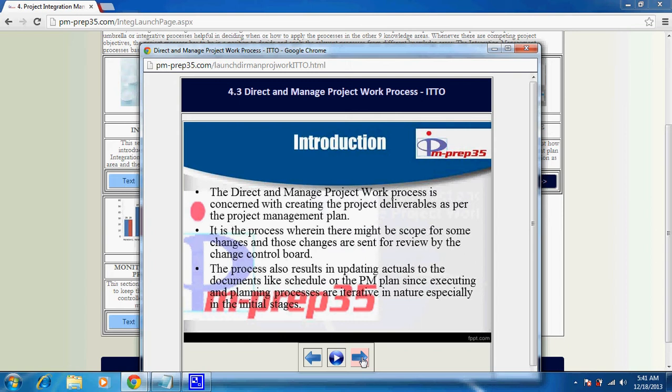If you look at a software development life cycle, you have a requirement analysis phase, a design phase, a development phase, a testing phase and an implementation phase. To gain better control over the project life cycle, you define the phases for a particular project. Within this life cycle, or within each of the phases, you can have your project management process groups running iteratively.